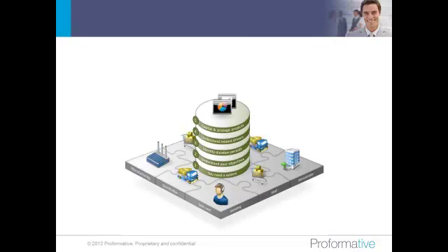And once you're done with your operating expenses and revenue planning and payroll costs, our recommendation, what we see as best practices, is to plan for capital and strategic projects separately from the rolling forecast. It really should be layered as a separate layer within the plan. This is because these kinds of projects, capital and strategic projects, have two very unique characteristics that require, one, that they are time independent of the typical rolling forecast. The reason is that projects can last months, sometimes years.